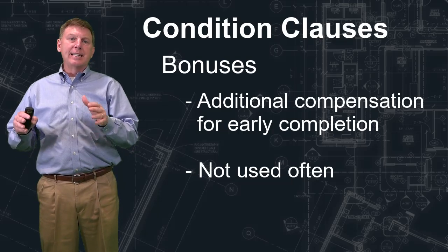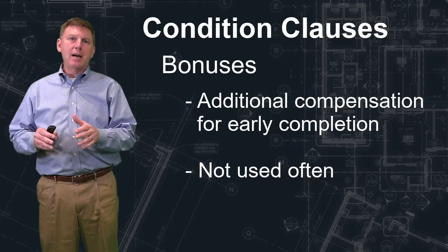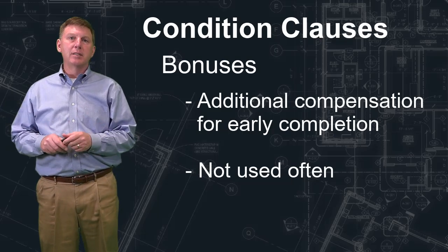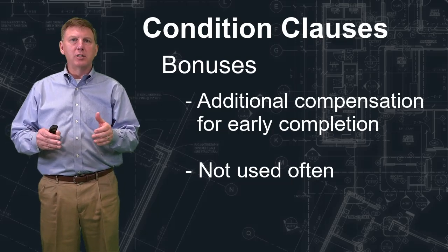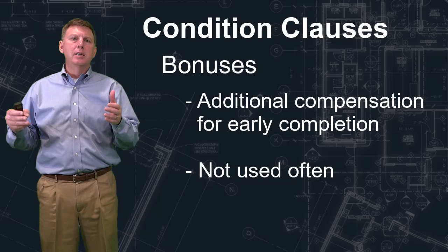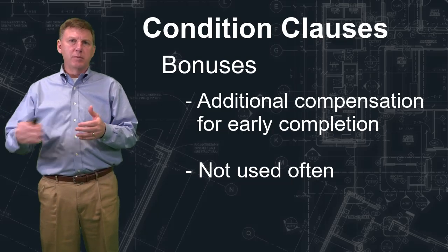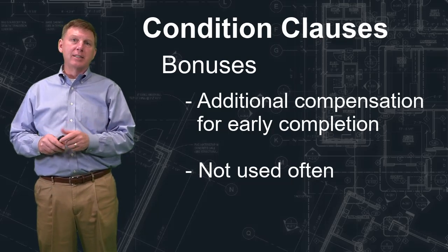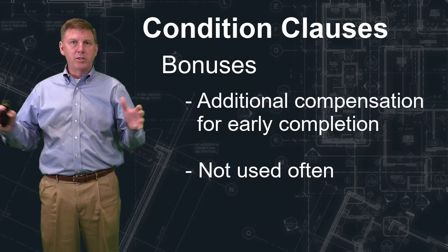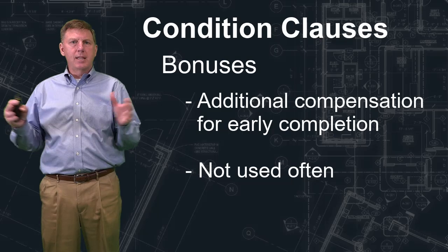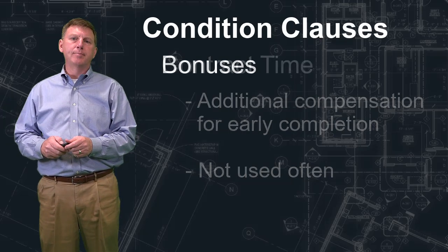They were incentivized to get that bridge done as quickly as possible to get that thoroughfare completed. So they were smart. They added a very large bonus, which the contractor achieved, and earned that extra money for really compressing that schedule and getting it done quickly. So bonuses are very good when you need to compress a schedule and get projects done early.